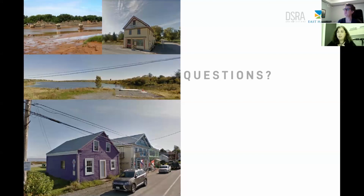their experience, it's often difficult to detect previously poorly done intervention, particularly in a wooden building, until a certain amount of material is removed. And these surprises are always to be expected. So a fair amount of allowance for the unexpected needs to be planned for. And then they go on to also note that because we're mostly dealing with wooden buildings when working on private homes here, yes, the lack of old growth wood is a real problem. How are you dealing with this in Lunenburg?